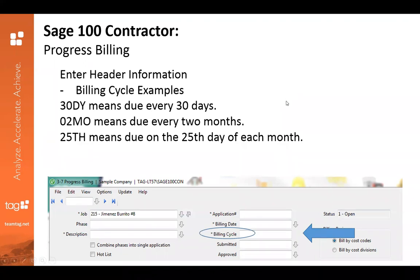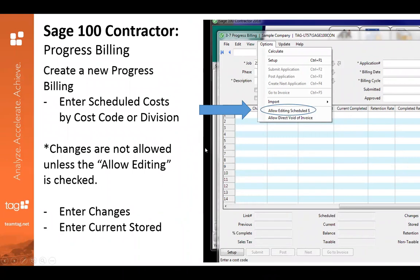I did send out the presentation PowerPoint printout to all of our registrants. If you did not receive that, feel free to email me and I'll send that over to you. There are some options when you're creating your progress billing — heading up to the toolbar menu at the top, you'll hit Options and you'll have two options: Allow editing scheduled dollar amount and Allow direct void of invoice. Make sure it's all set up correctly, as changes won't be allowed unless you have that checked off.